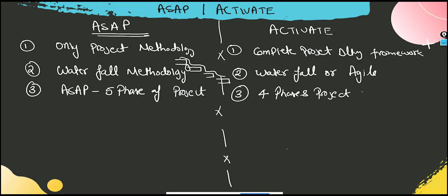Activate says that it would be starting from your project, so ASAP is a four phases project. So the first phase is actually your prepare, then explore, realize, deploy. These are the four phases which Activate says that it would be there.